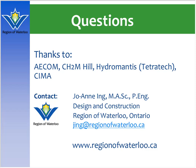We found that we were initially going to go with 4 clarifiers for each of the plants 3 and 4 of the secondary clarifiers, and we actually reduced the number of clarifiers to 3, and that had a fairly significant, I don't have the actual dollar amount, but it was probably just under $1 million worth of savings in concrete. Another consideration in the value engineering was the linear motion mixers, and from an energy and operations and maintenance standpoint compared to using jet mixing, we found that the capital costs were slightly less than using the linear motion mixers, but also the overall energy savings. We were going to save about $1 million in O&M costs.